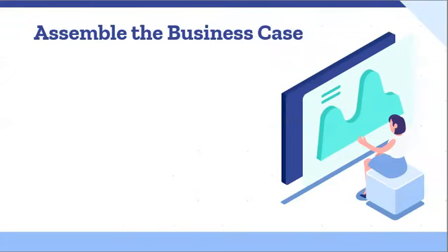Not all business problems or opportunities require a formal business case. Executives in an organization may approve programs and projects based on competitive pressure, government mandate, or executive inclination. In those cases, a project charter to initiate a program or project is sufficient.